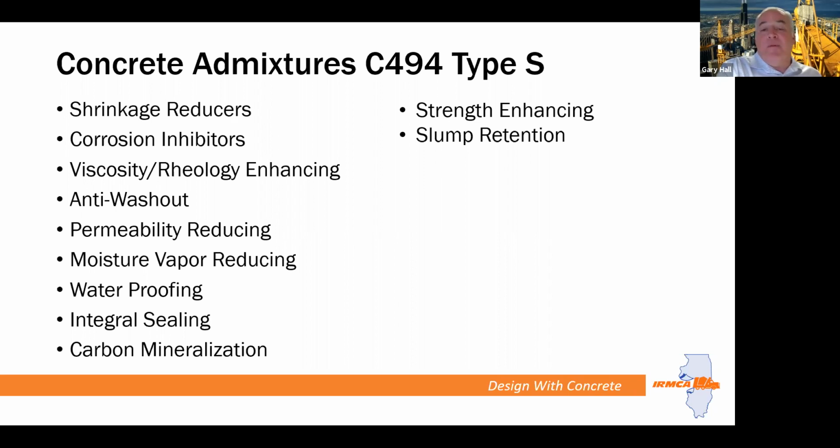Good example of that would be you have a runway, a live runway that has to be shut down temporarily, mass transit platforms, or pavements even, that you have to get temporary closures, and there could be potential for big fines if it's not reopened in a timely fashion. So that gets us a lot of strength really fast.